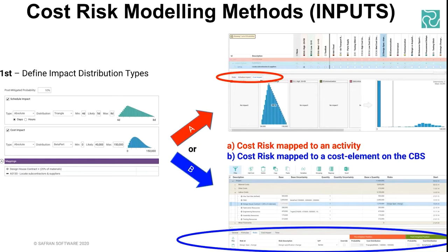We do, however, offer an alternative, which is method B, which is there's a cost tab or module where you can articulate and define your own cost breakdown structure. And anecdotally, I prefer method B to method A. I think method A, I rarely, if ever, saw done in any of the projects in my career, because it just seems to be such a large undertaking for the schedulers in conjunction with the cost estimators, and to do it right and to try and make maybe square costs fit into round scheduling holes. It doesn't quite work for them all the time, so it's very difficult to do.